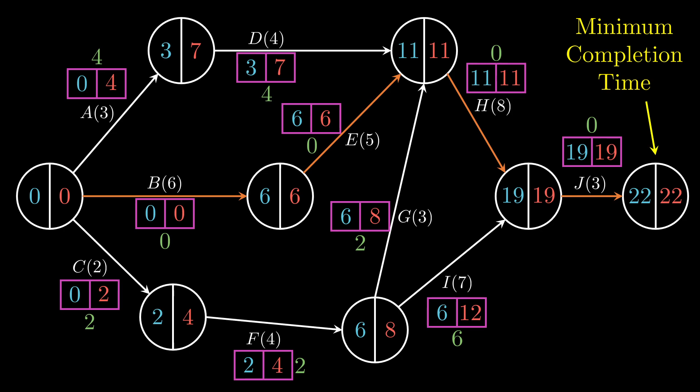So there's always this chain of activities where nobody can afford to wait. There's 0 float time the whole way through, and we call this the critical path.